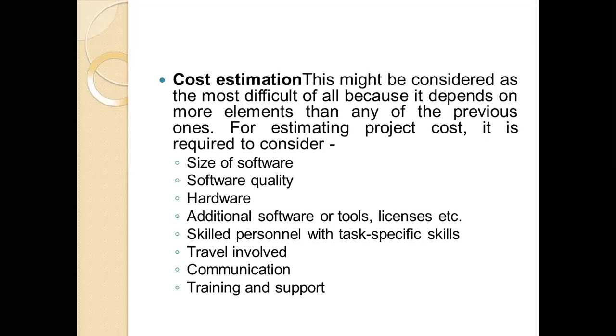For estimating project cost, it is required to consider the size of the software, software quality, hardware, additional software or tools, licenses, skilled personnel with task-specific skills, travel involved, communication, training, and support. So whenever you are estimating the cost, it should not involve only the size of the software. It should not consider only the lines of code. It should consider the quality of the code, the hardware, the tools, and licenses required for particular software designing,